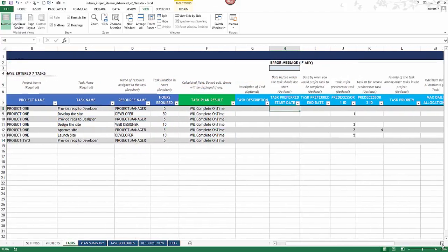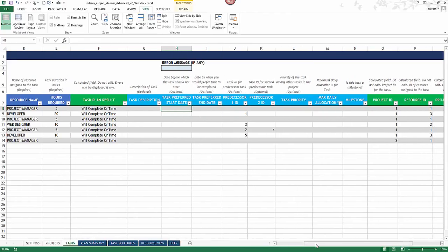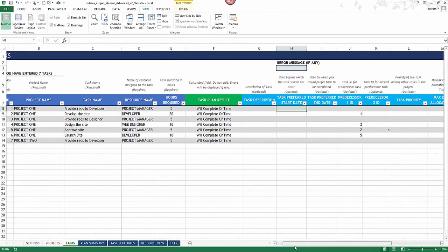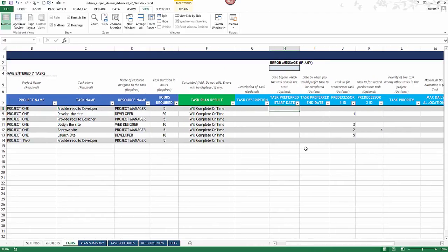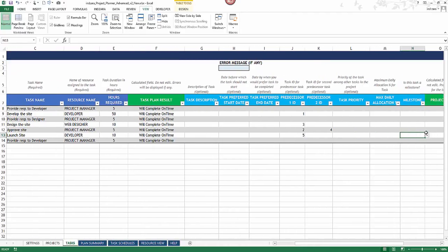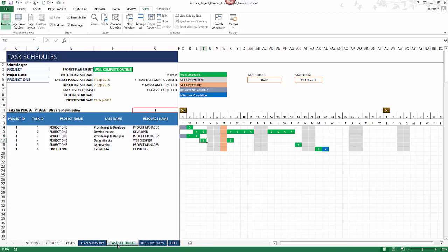Another feature is milestones. For 'launch site,' go to the milestone column and choose yes. In the task schedule, the milestone is shown ending on September 22nd, displayed in a dark blue cell and highlighted in bold — making it easy to identify at a glance.